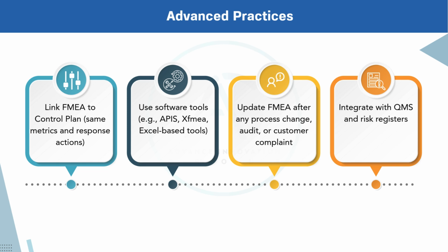Update FMEA after process change, audit, or customer complaint. FMEA is not a one-time document. It must be updated whenever there's a process change, non-conformance, audit finding, or even a customer complaint. This ensures the risk assessment reflects real-world conditions and helps maintain the relevance of your mitigation plans.